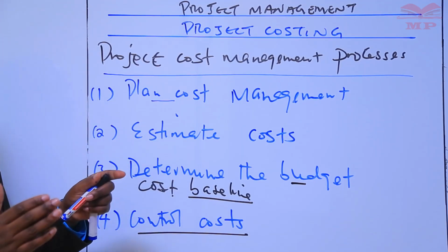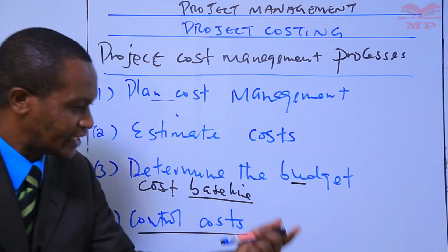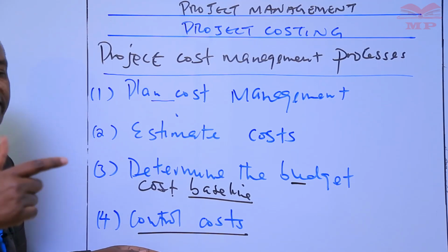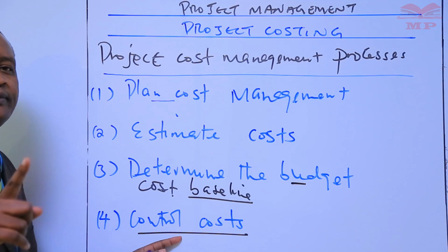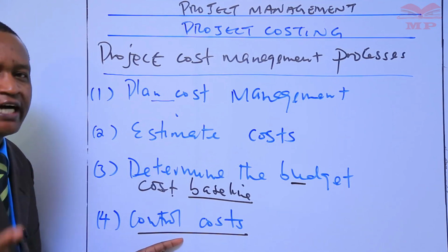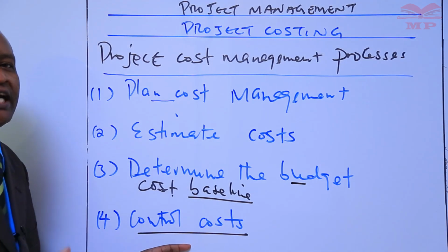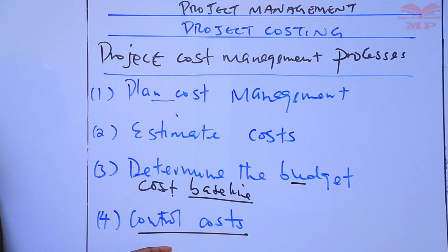So that begs for what we call monitoring of expenditure. Monitoring of expenditure of funds without regard to the value being accomplished for each expenditure has very little value to the project.